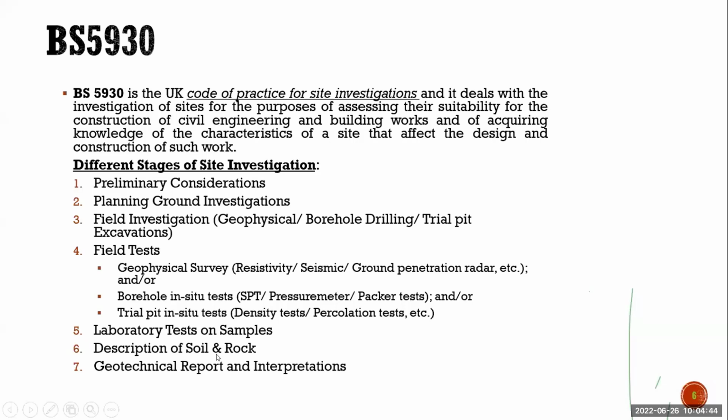Now, laboratory tests. We will collect some samples, then we perform some lab tests, then the description of soil and rock based on all these parameters. Then we collect the data, keep everything in the geotechnical report, and interpret the data. Okay, these are the different stages of site investigation as per the BS.